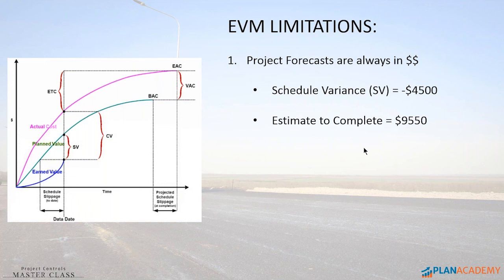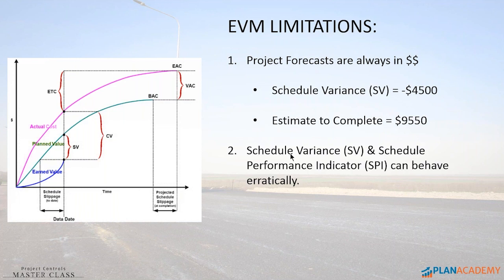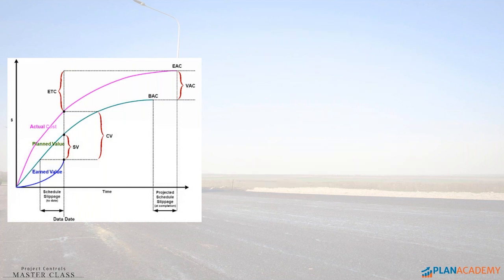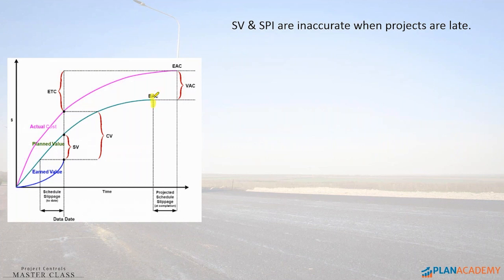Number two, there's another problem here. Schedule variance, shortened to SV, and schedule performance indicator, SPI — these guys can behave erratically. When projects are past their expected finish date, when we get into late situations where projects are going beyond the planned finish, going beyond budget at completion and out, then we start to see erratic behavior in SV and SPI.